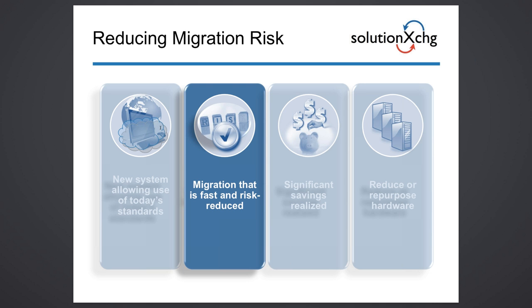They were talking a year and a half for migrating documents. Can you imagine what cost you will incur internally? It might not even need a consultant for a year and a half, but the project is running for a year and a half versus literally 16 days when you choose the migration approach we were choosing in this particular case.